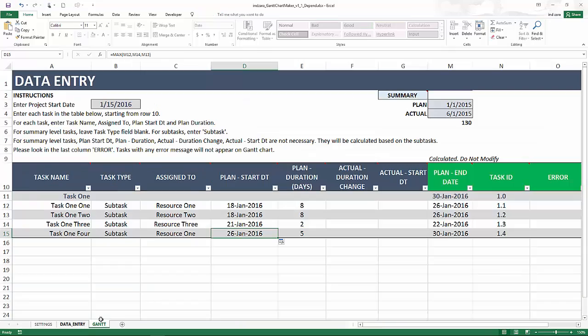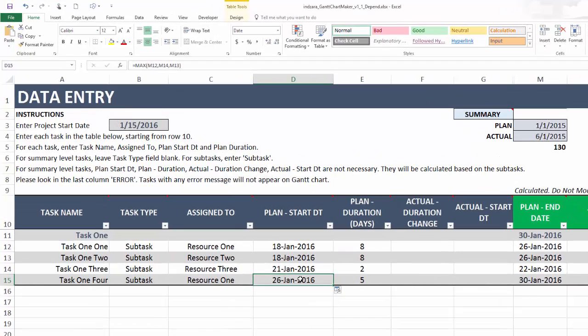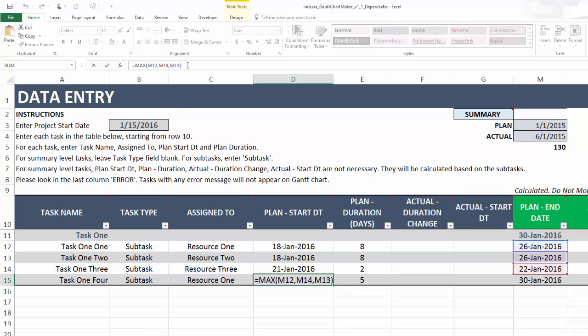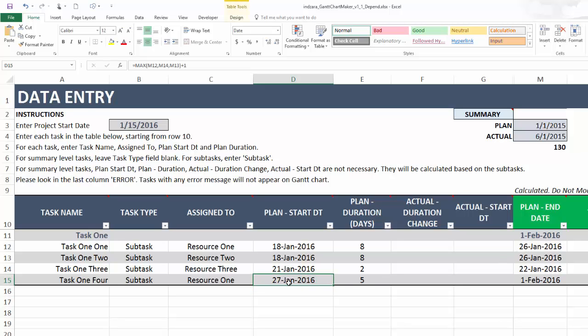Now the last thing I want to show here is if you think that the dependency works in such a way that the plan start date of a task is not just the maximum day of the predecessors' end dates, but you also need to add one more day of cushion or buffer, you can definitely type plus one here. Now you will see that the end date of the tasks are the 26th, but then the start date of this will be 26 plus 1, the 27th.